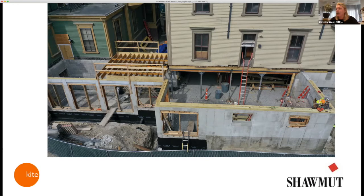So one of the things that happened right after the move is, we'd done a survey of all the walls beforehand. We set up a bid allowance so that our costs were covered in the budget that the university set aside. And we did a post-move review of all the cracks and any structural issues. There was one location where somewhere in history, somebody had moved a closet, not understanding it had some structural role, and the ceiling was starting to collapse a little bit, but we spotted it and fixed it. Things do shake around, and it's kind of like an earthquake. This is a little gentler than that, but there's enough redundancy in these buildings, thank goodness, that it's pretty resilient. So it could have been a lot worse.